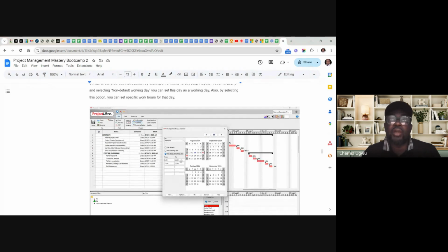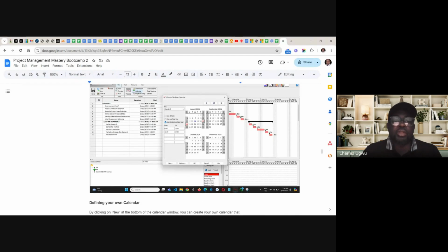If you are working on weekend, you might just say, okay, we're working on weekend, but it's going to be 9 o'clock to 12 o'clock, and everybody will go home. You come here and you select the time from 8 to this, or whichever time you want, you select it from here and save it. So you make your job more tidy.